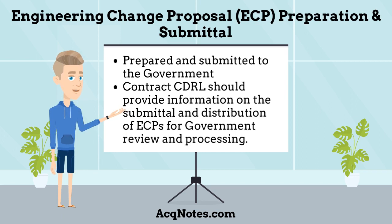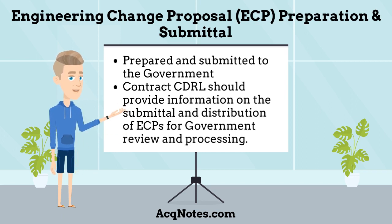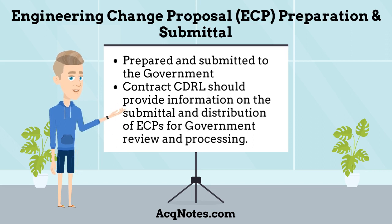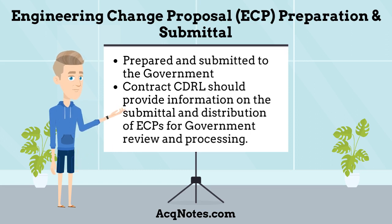How is an Engineering Change Proposal prepared and submitted? Formal and Preliminary ECPs are prepared and submitted to the government in accordance with the configuration management requirements of the applicable Contract Statement of Work and Associated Contract Data Requirements List.